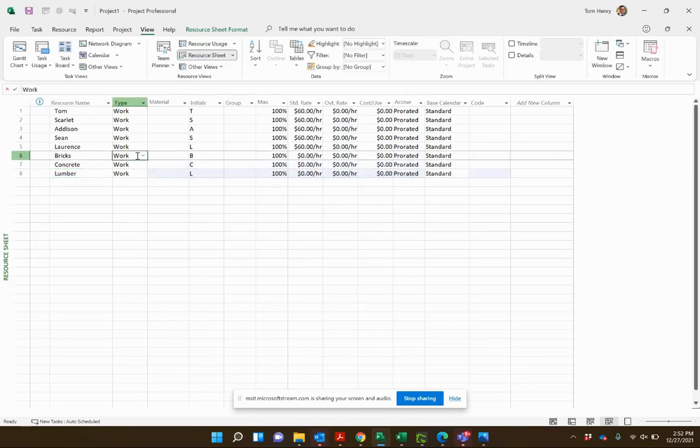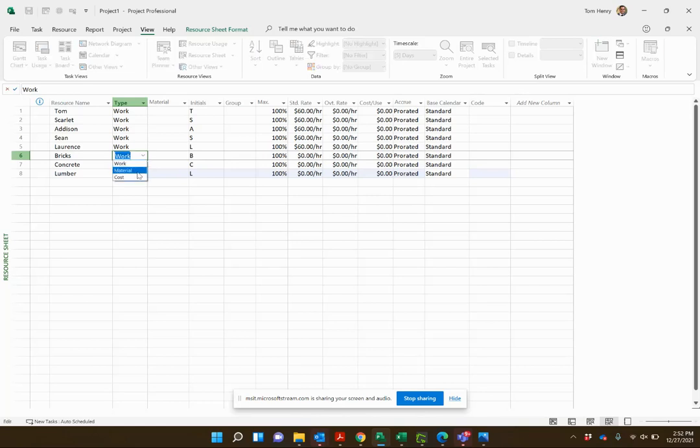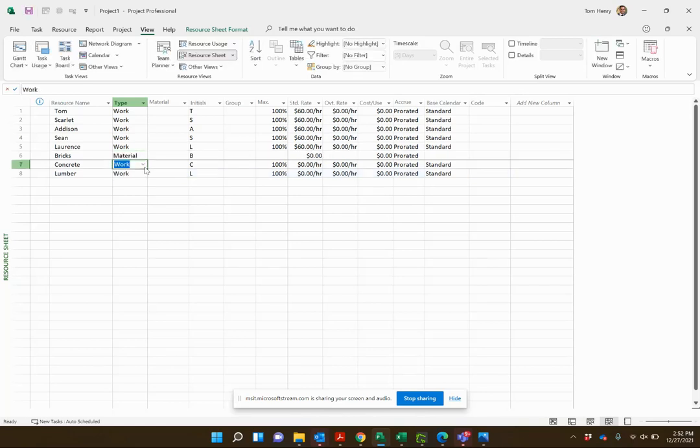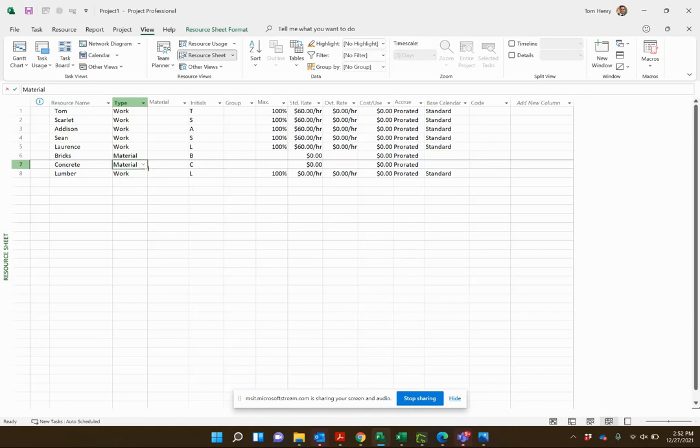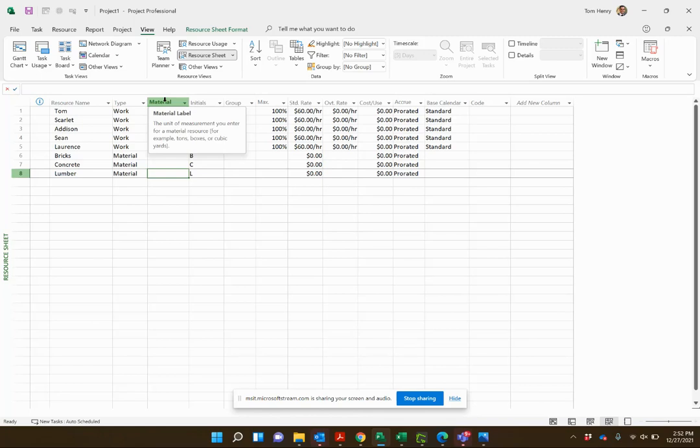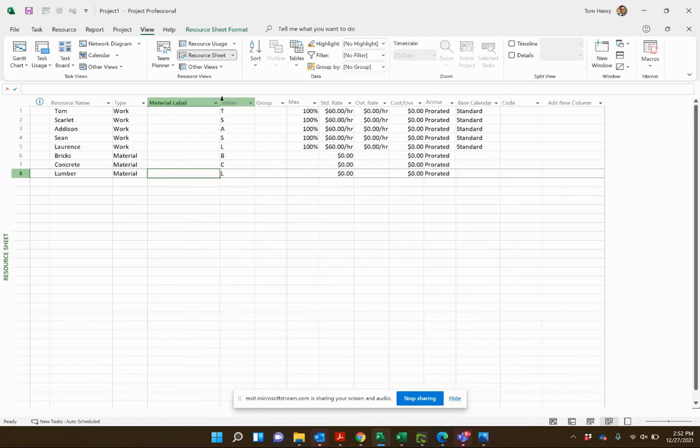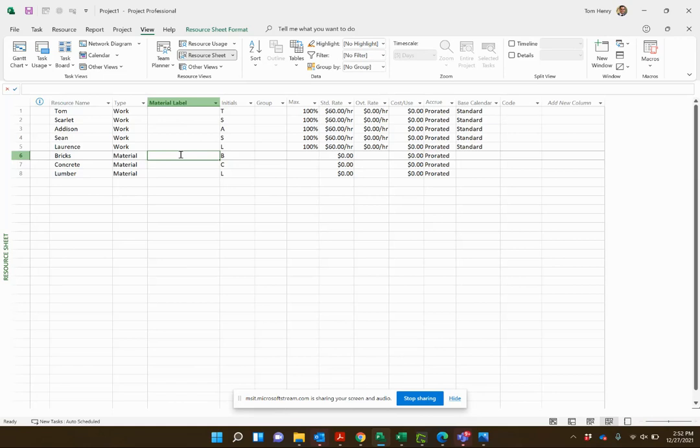First thing you need to do is switch out this type to be material. You can even drag down just like you do in Excel. You notice that this column here is material label. If you expand it out, material label is the unit by which you want to calculate. It could be pallets of bricks, could be number of bricks. I'm going to go for pallet.